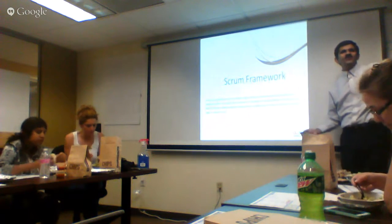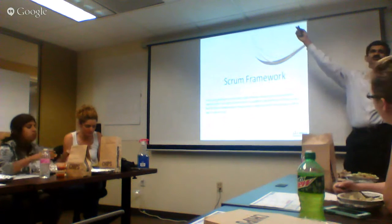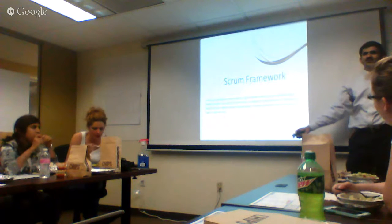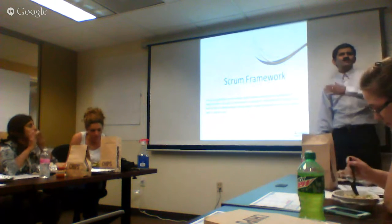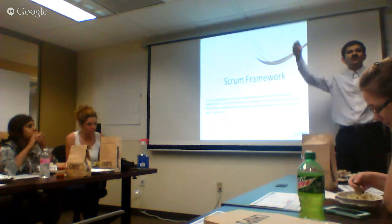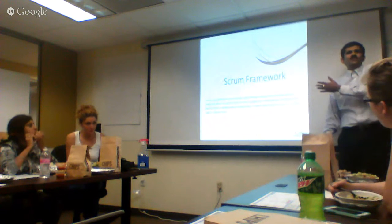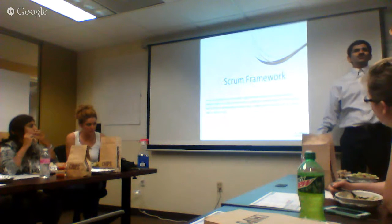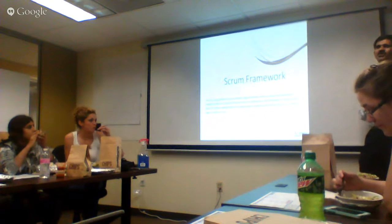If you have to change the requirement, you have to go through a big process called change management, where the change management group gets involved. So there are a lot of restrictions. Once you pass coding, you have to move your code to staging or QA, and then there is no way you can go back unless you have a change request in place. So there are a lot of restrictions, a heavyweight methodology, I would say.